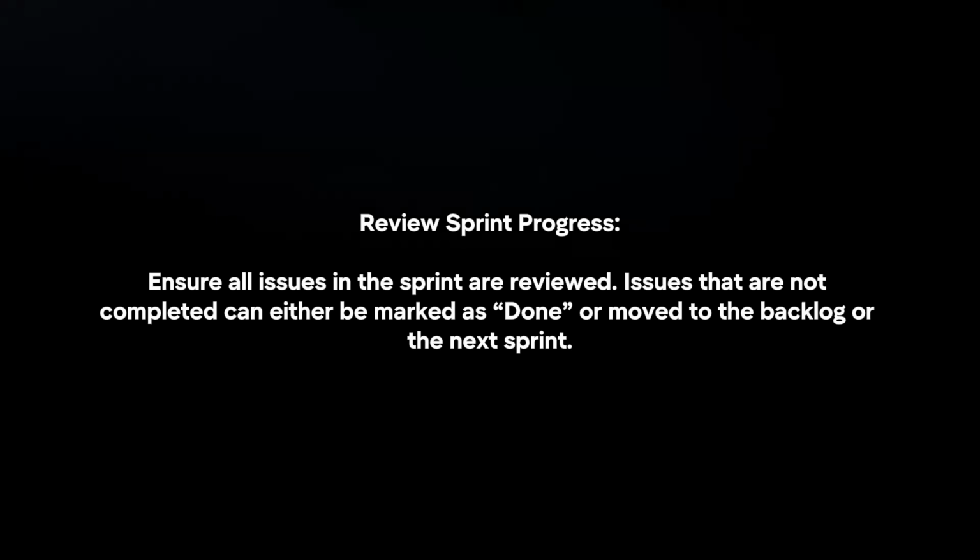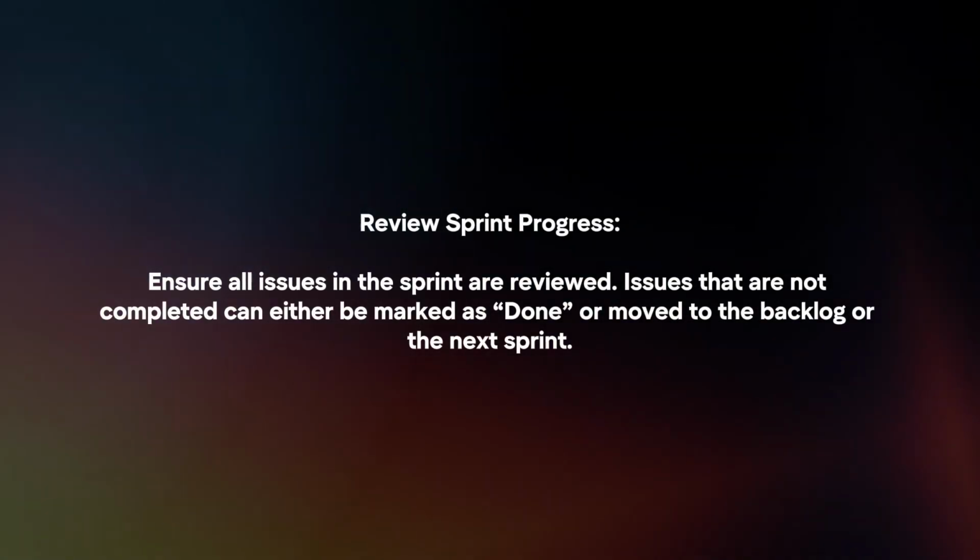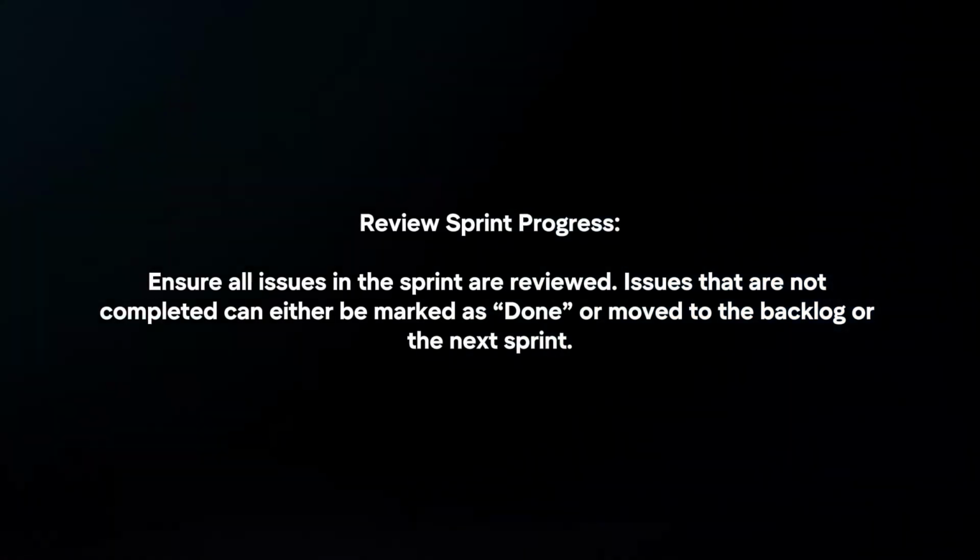Review sprint progress. Ensure all issues in the sprint are reviewed. Issues that are not completed can either be marked as done or moved to the backlog or the next sprint.